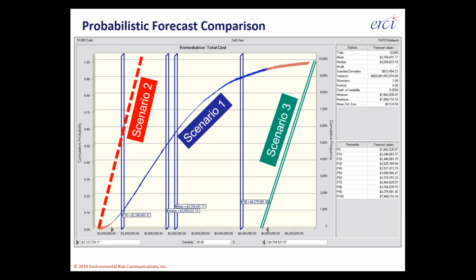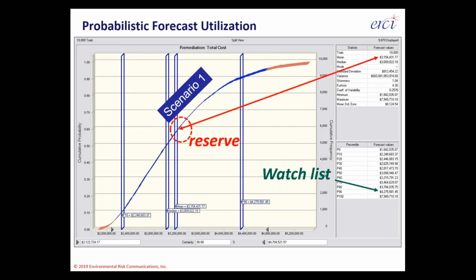And because of the slope of 1 versus 2, we prefer, if we can, to go for scenario 2 versus scenario 1. That's, again, two of the things that can come out of using a probabilistic forecast comparison: you can figure out what scenarios are not going to be workable, and whether in a one-versus-one comparison, one is more attractive to your organization, all other factors being equal.